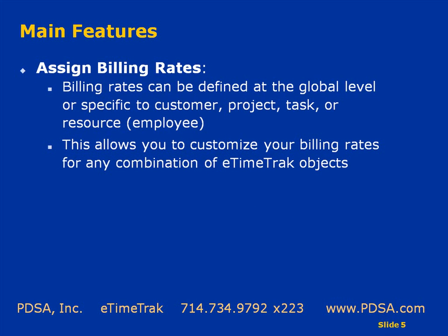You could also assign billing rates. Billing rates can be defined at the global level, like what's the billing rate for your entire company, or you could provide additional granularity for a particular customer, or a project for that customer, or for one of many tasks, or actually for the resource itself. Any numbers of these combinations are all valid concurrently at the same time. So that customization is very powerful.